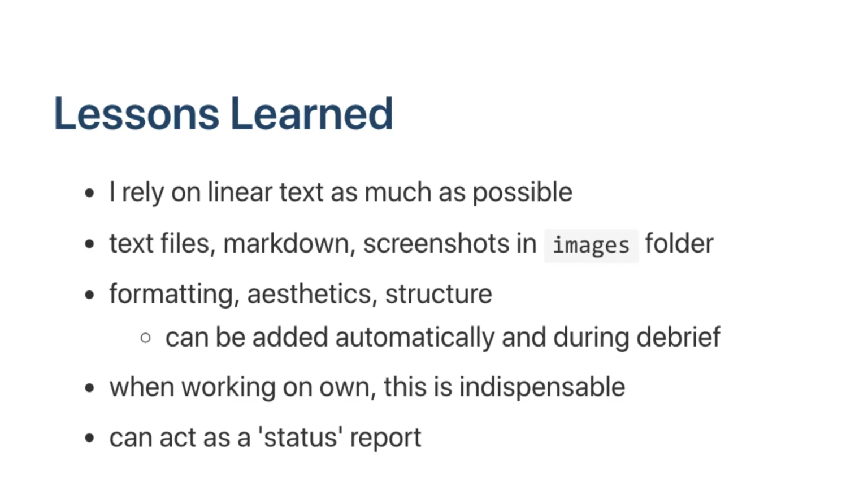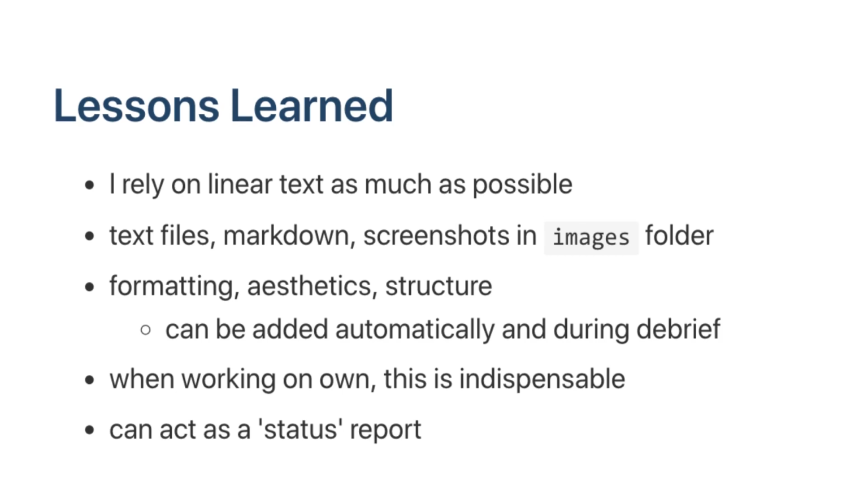What I often find is that having done a debrief, I've got a summary of what I'm doing or what I've done, which I can then use as a status report to copy and paste into Jira or whatever management system we're using. So I may not put my raw notes into there. They may be saved somewhere else, but the summaries at a minimum will be put into the overall project tracking system so that people have insight and visibility into the testing that I'm doing. But the debrief is an absolutely key approach when we do exploratory testing.